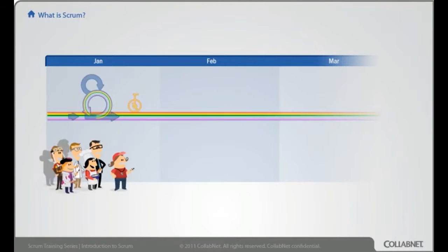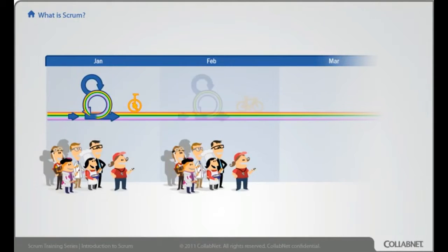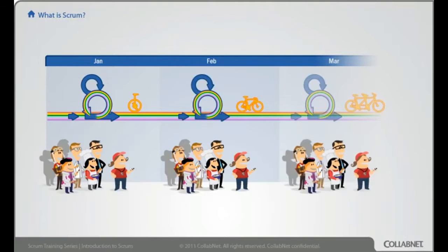To make a shippable product every 2 weeks, we're going to want people with skills in testing, in design, in business requirements, in coding, all on one cross-functional, self-organizing team. Now, instead of waiting for the end to start our testing, we'll start testing with our very first sprint. Instead of doing all the design up front, we'll do a bit of design every sprint until it becomes continuous design. We'll do small amounts of continuous redesign and refactoring to avoid technical debt. Every sprint combines all aspects of the work. A Scrum team should collaborate together instead of working in phases with handoffs.